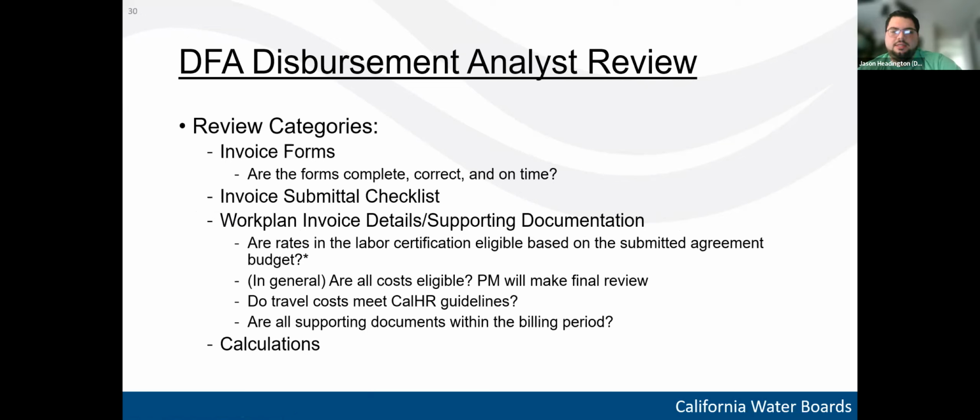And so we treat that as the maximum for that classification. So when we're checking individuals on the labor certification, we just need to ensure that their rate doesn't exceed the rate set for that classification in your budget. And so that's what the disbursement analyst and the PM are going to be looking for in this item.